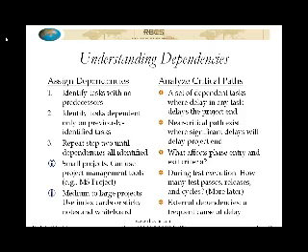We can go through that and take out the index cards that have the tasks that have no predecessors. Okay? And you can go through the stack, again, the list of tasks, and say, okay, these tasks depend only on those tasks which had no predecessors. And then go through the list again and say, these tasks depend only on those tasks which depended only on the predecessors. And you can repeat that process iteratively until you've identified all the predecessors for the tasks. And that is literally one way to do it.